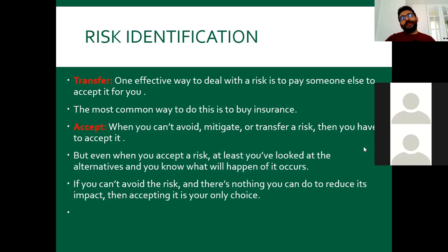So when you buy a car, you take some insurance as well, right? If there are any traffic accidents, God forbid, they will pay the money. So you actually transfer that risk to another company by making insurance. You pay some amount of money, of course, but you don't think about that if there will be this kind of problem. So in a project, you could also do that.